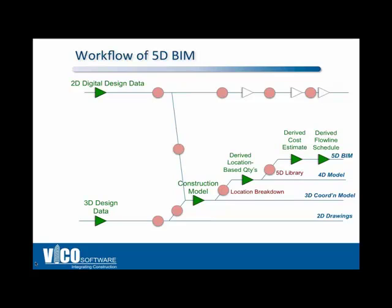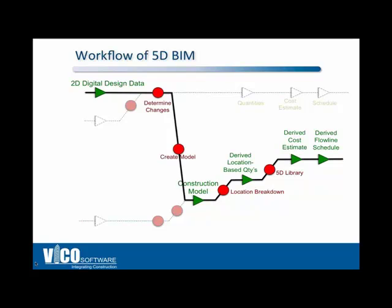This is the 5D BIM line we keep talking about, and this is how our customers usually get to it. More often than not, there isn't a 3D model from the design team yet — we do see that changing, but way past 50% of the time there's not. So somebody is looking at 2D data, determining changes, creating a construction model, adding locations, deriving quantities, linking it to their 5D library, and deriving costs and schedules. It's a highly productive, repeatable process.